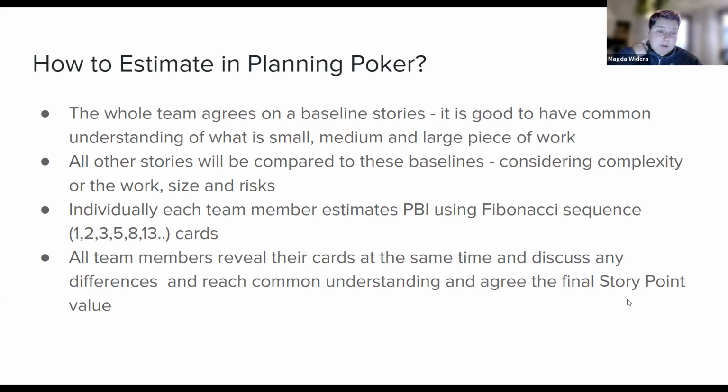And then each member of the team estimates using the Fibonacci sequence, like I've just mentioned, using those cards. And I am happy to answer a question, what is a Fibonacci sequence, later on, because I've also discovered that quite recently. And all the team members reveal their cards at the same time and discuss any differences.